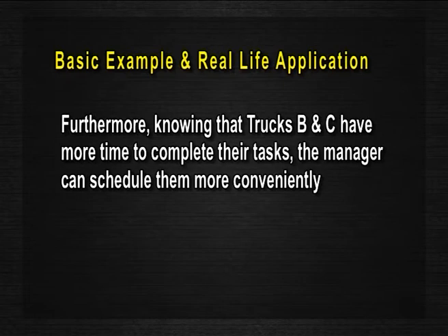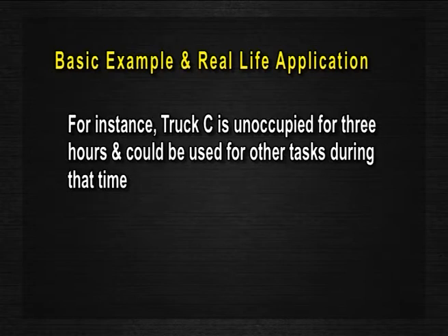He or she will not waste time and efforts on reducing the time spent by trucks B and C. Now, furthermore, knowing that trucks B and C have more time to complete their tasks, the manager can schedule them more conveniently. For instance, truck C is unoccupied for 3 hours and could be used for other tasks during that time.